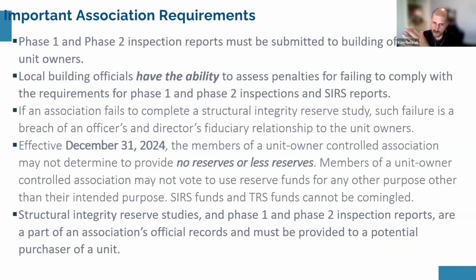And then the building owner will need to retain and have a contractor get permits to accomplish the repair work to repair that significant structural deterioration. And under the statute, they have 6 months to make efforts to complete that work. Or if they need more time at the 6-month mark, they're required to go to the city and say, we need more time, please give us 6 more months. And the city at their discretion will give some amount of time, presumably 6 months. I think it's actually required to give 6 months more, until the repair work is completed.